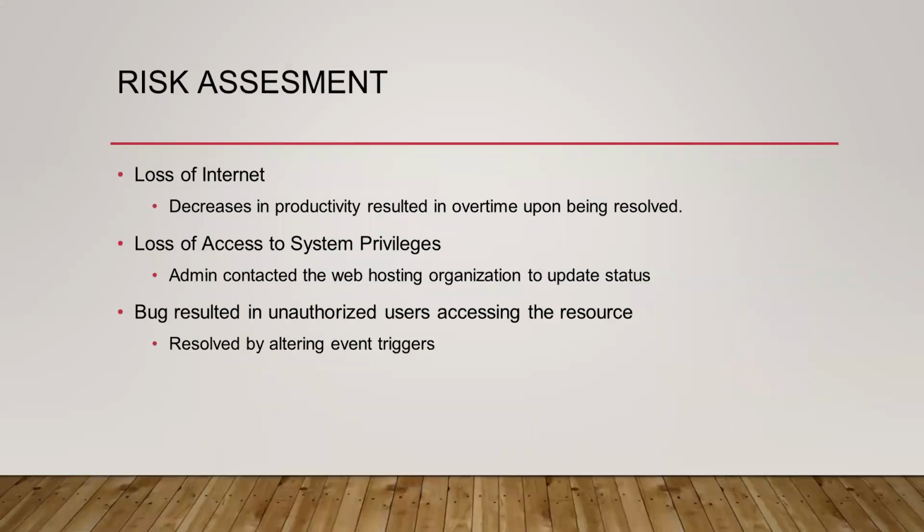All right. There were 2 instances where we lost our access to the internet, which caused several hours worth of downtime for us. This resulted in our workers not being able to work during that time. To remedy this, we assigned overtime for our workers to do the work once the problem was resolved.